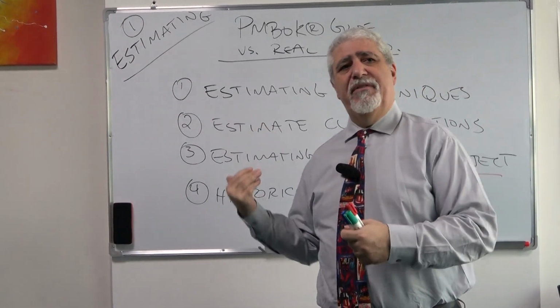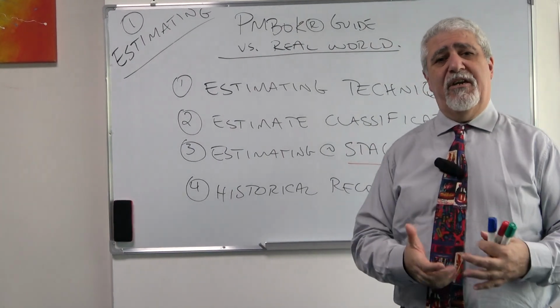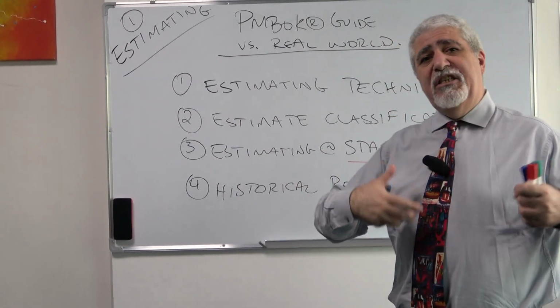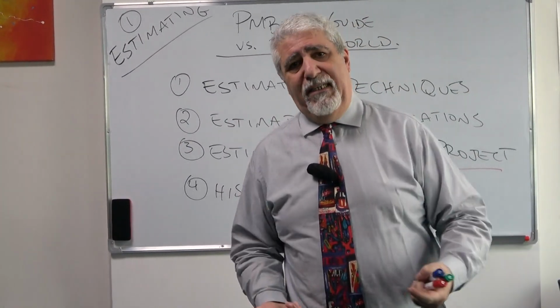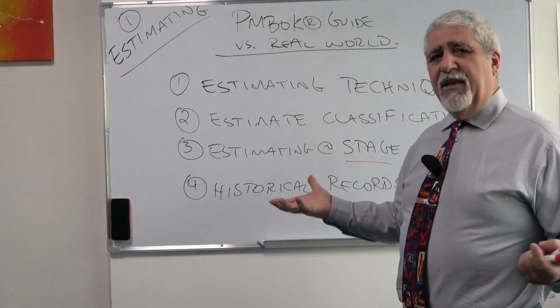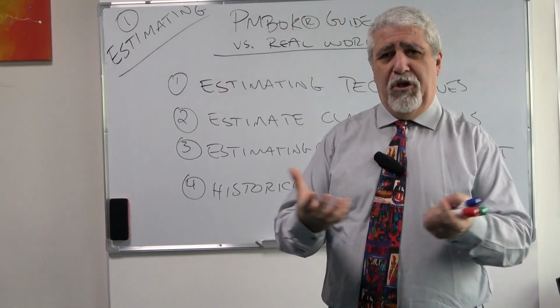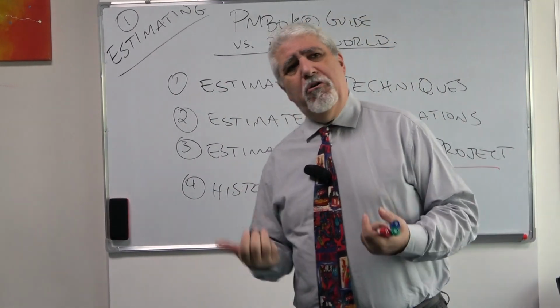Maybe that project was done 5 years ago, so we will have to include some escalation or inflation to bring it to today's currency. So if we are in the initiating processes, obviously when we are talking about the charter, the best we can do is maybe use this kind of analogous estimating technique that is very high level. We don't have detail.